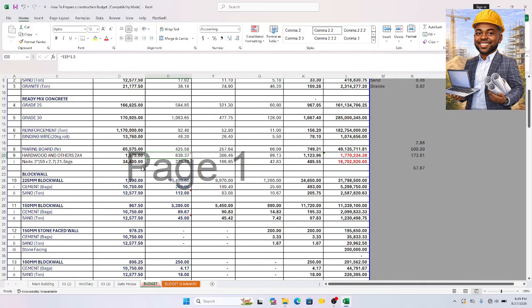Okay, and I will need hardwood now for every, I think I made a comment here, for every one board we will need about 1.5 length for brazing, 2x4 if you're using 2x4, right? Some people nowadays, some of even their column, they use acropop, 4 acropop as brazing. Then you use some wood to put them together, and then your column is standing. And then acropop also for your suspended floor, as the case may be.